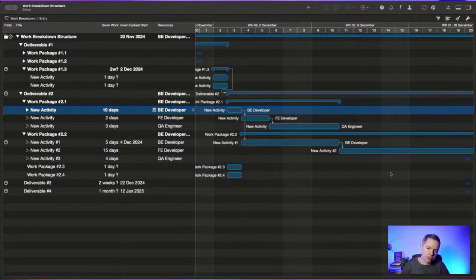Again, how do you identify those dependencies? Either it's a technical limitation or constraint, and you have to do it this way. There is no other way around it. You cannot build a dashboard without data, for example. So that's why you need to do it this way. Or if there are no dependencies and you have a lot of tasks that you can do at the same time, you will make this sequencing on your discretion just to structure the project and make it more manageable. All right. So this is how you identify resources.